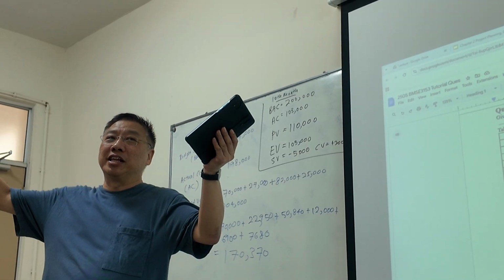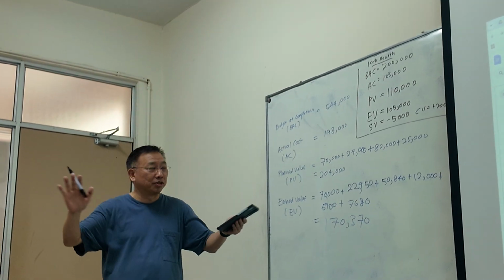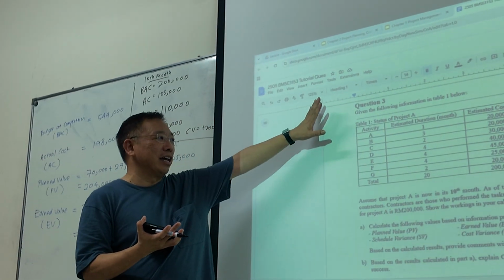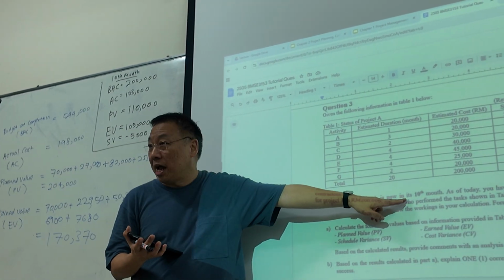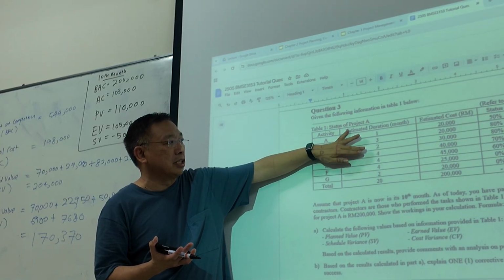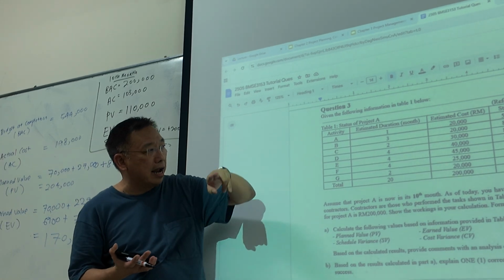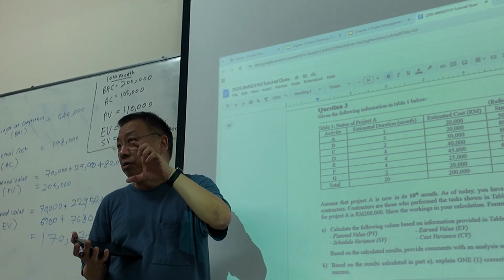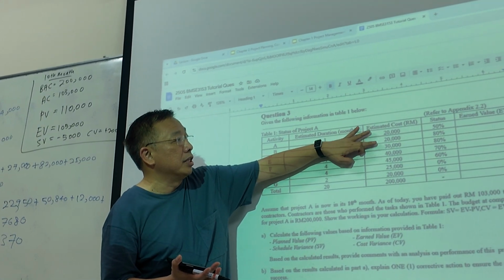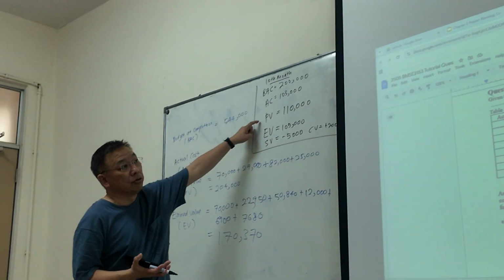So very quickly here, just in case some of you are not sure, I just want to highlight things. For those who got it, it's okay. The current project is 10 months, right? So you calculate 1 plus 3, 4, 4 plus 2, 6, 6 plus 4, 10. So the current month is between D and E, so you draw a line there. So you know your plan value is up to the current month, which is 20 plus 20 plus 30 plus 40, which is 110. That's how you get it.